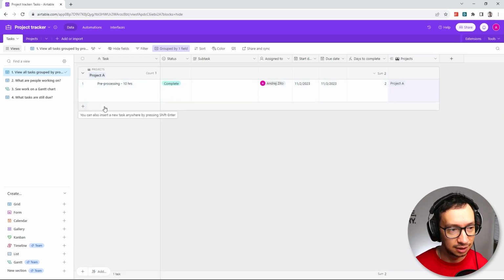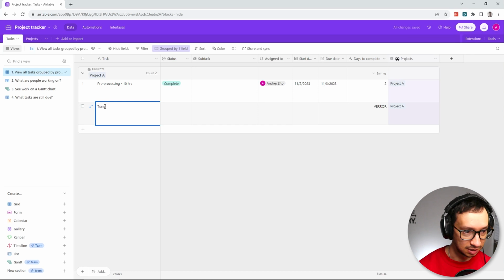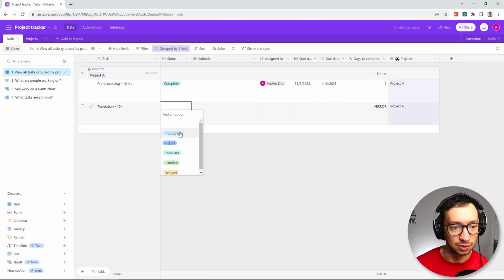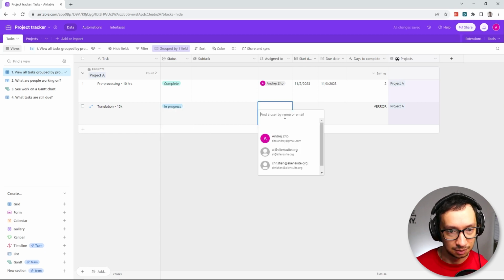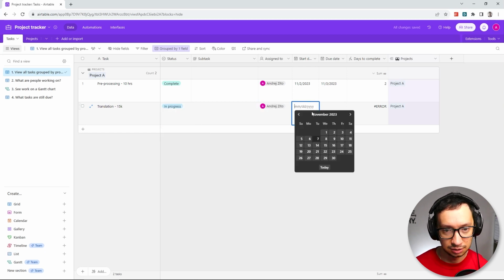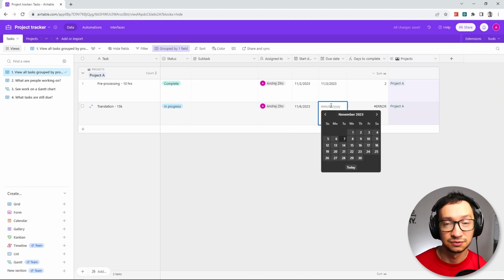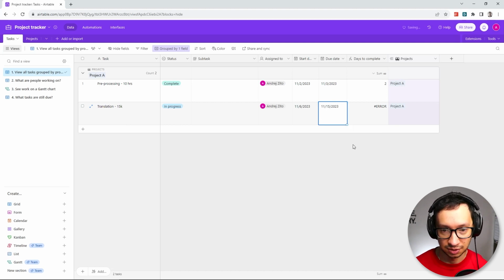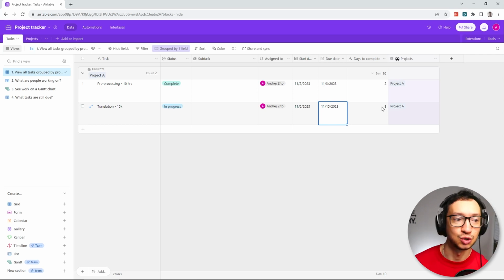Next, I'm going to add another task under project A, which should be translation. This one will be 15K words. And we're going to say that this one is in progress, and I'm going to assign it to myself. It's going to start, let's say, yesterday, and since it's 15K, it should be roughly 8 days. So that's 1 week plus 3 days here, right? 8 days. Perfect.